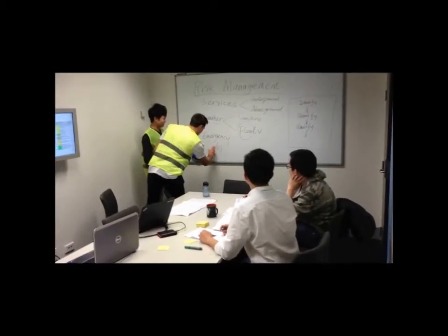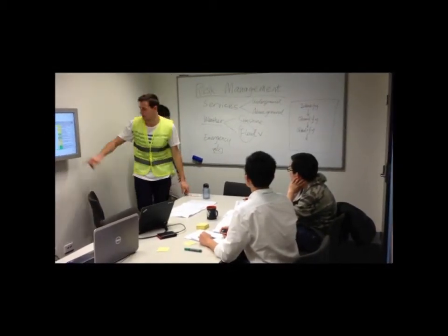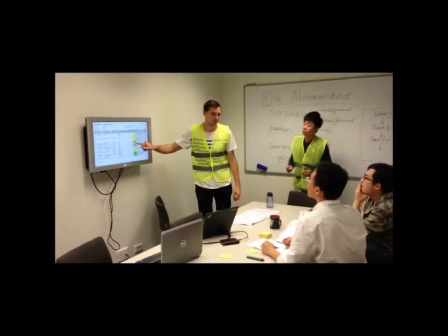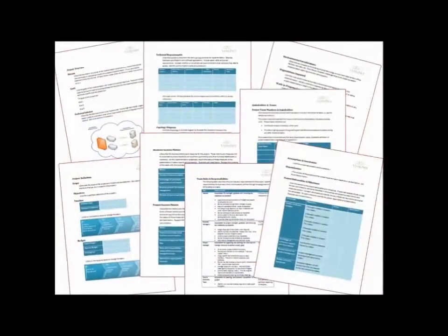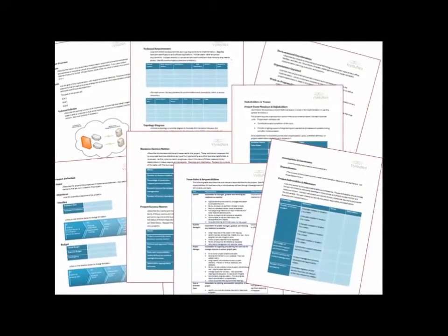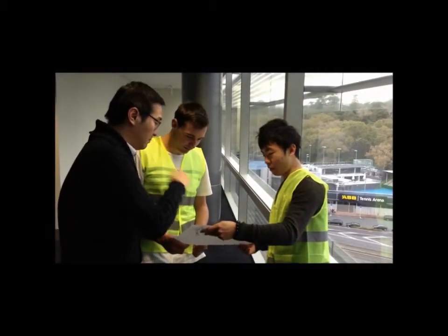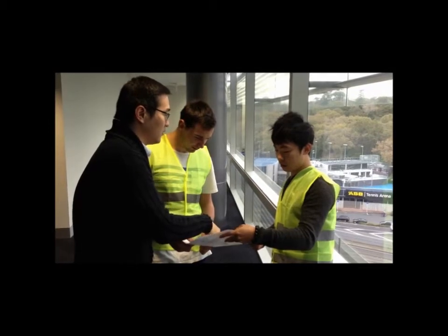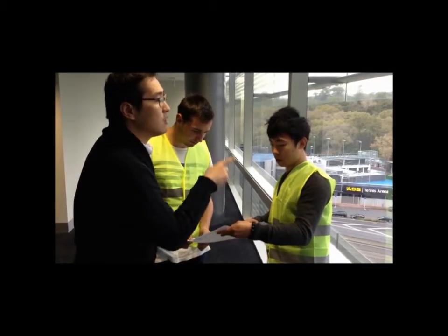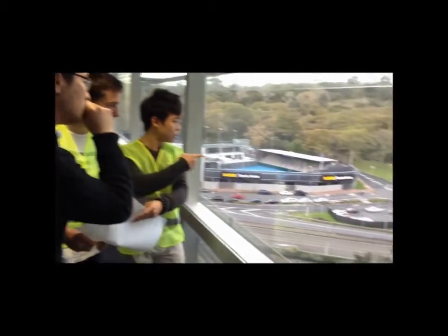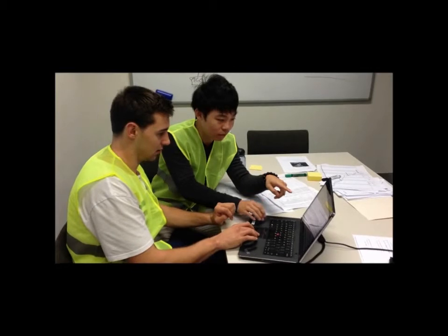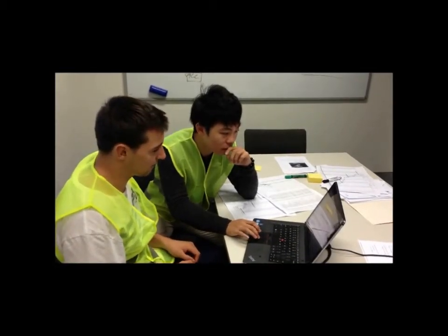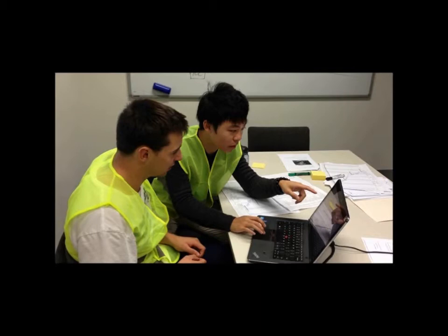The last step in the risk management process is to control the risks and implement the strategies decided on for each risk. This involves updating project documents such as the risk register and the project management plan, communicating to those exposed to the risks the nature of the risk and how they can avoid the risk, enforcing the strategies decided on to avoid the risks, and keeping clear records of incidents or events which nearly affected or did affect project outcome.